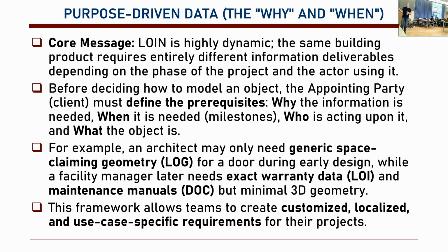So, based on that, for instance, an architect may only need generic space-claiming geometry, LOG, for a door during early design, while the facility manager later needs exact warranty data and maintenance manuals, DOC, but minimal 3D geometry. A facility manager does not need the geometry. They only need the door number. What was this one? I always forget. Is it 3?